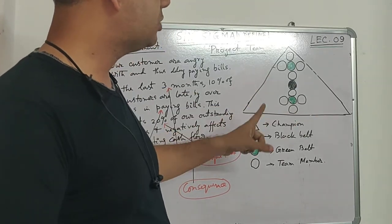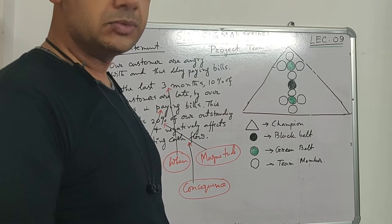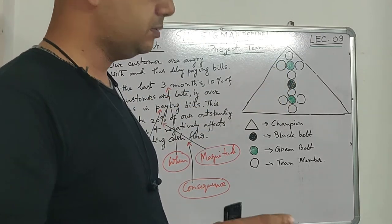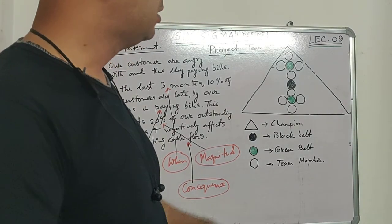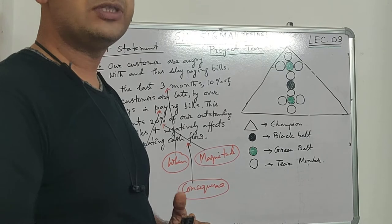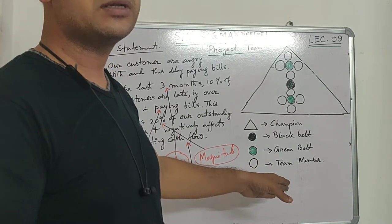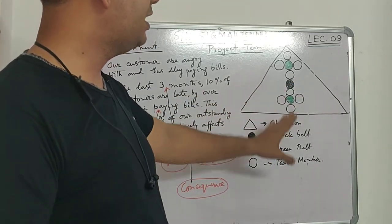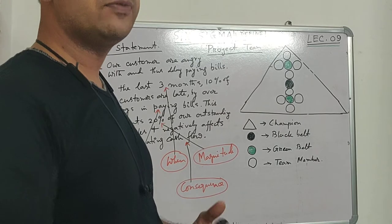There should be one Black Belt who is certified or trained to hand-hold the team throughout the project journey. There will also be two Green Belt holders who have some knowledge of Six Sigma and have carried out one or two projects earlier. The remaining members are fresh; during the journey they will learn Six Sigma methodology and can subsequently become Green Belt holders after completion of the project. After finalizing the team there are various exercises like voice of customer collection, surveys, and related activities.